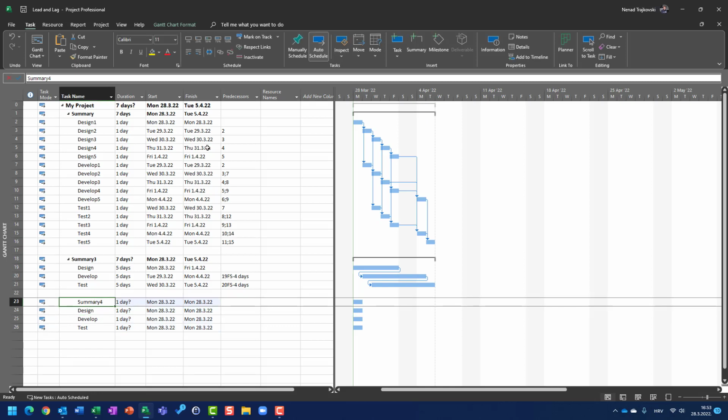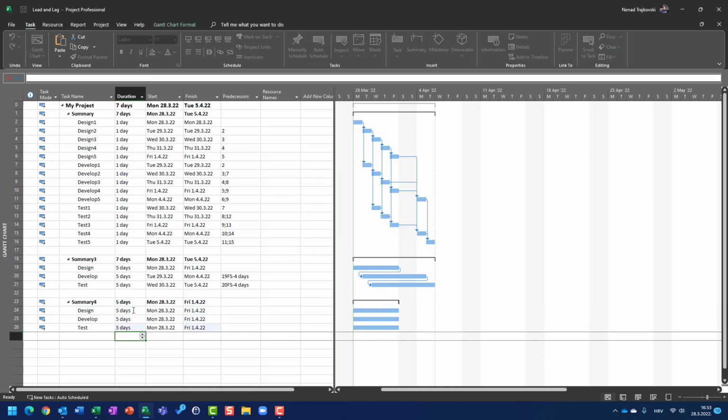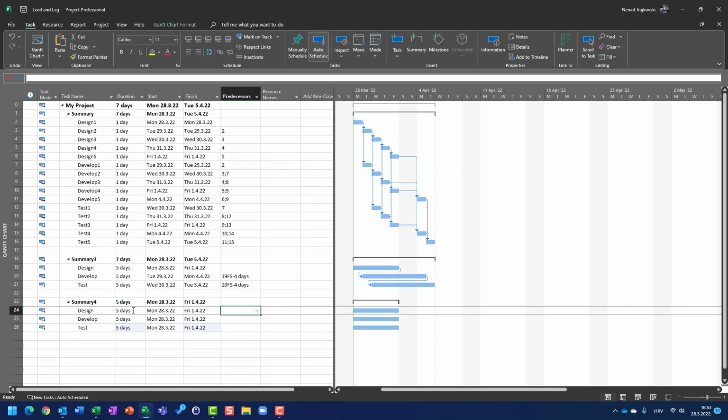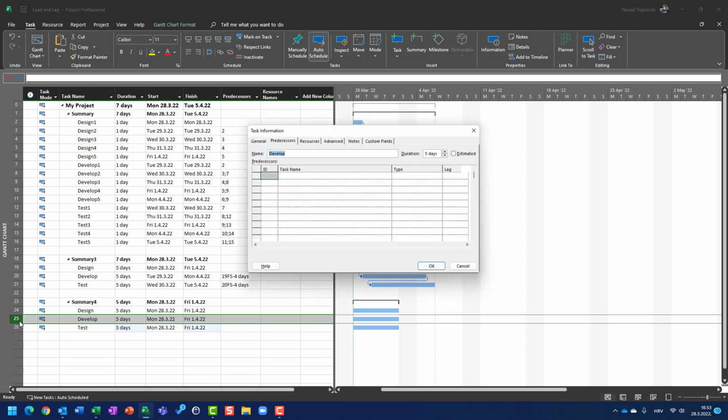I can say 5 days. But instead of finish to start, I will put start to start. So I will say that the develop will start not immediately after design is started, but 1 day after.